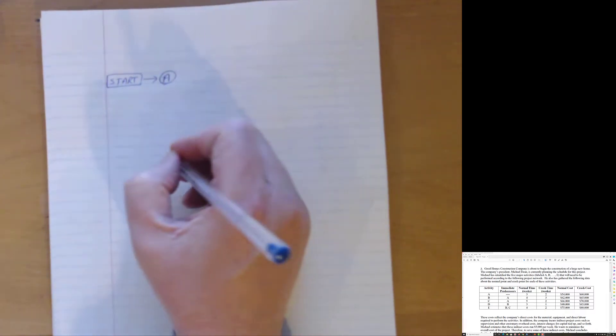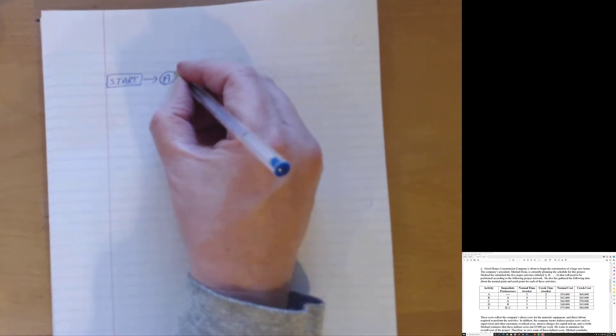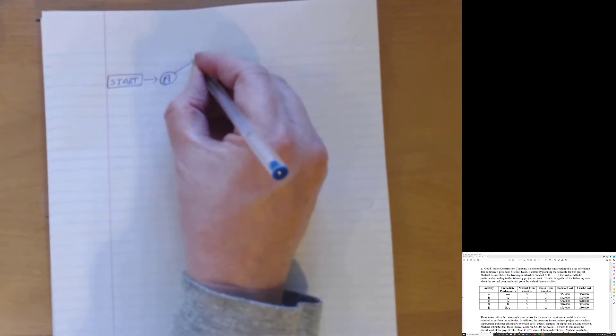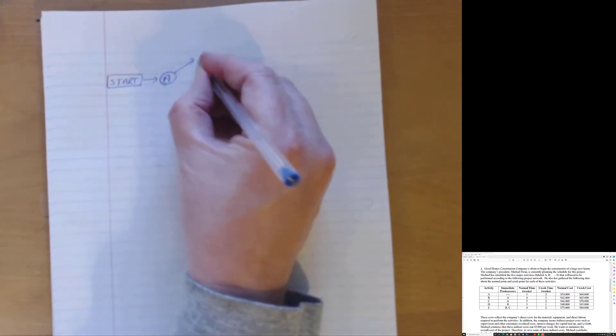First step here is we're going to draw out the network diagram. So we have a start like we always do. Everything has a start. And what do we start with? Well, we see activity A has no immediate predecessors, but it is the only activity that has no immediate predecessors. So that makes A a beginning activity. So I go from start to A. A is the only beginning activity. However, B and C both have A as immediate predecessors. So A goes straight to B and A also goes straight to C.